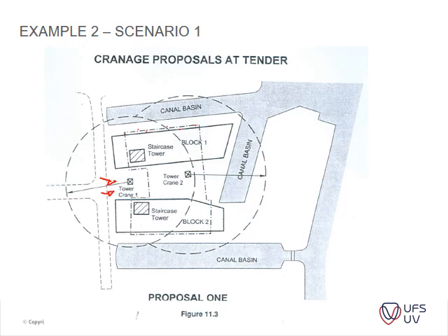You can see the access is limited to this crane here, because it doesn't necessarily reach everywhere. So that's one of the considerations that you need to take into account, is access to site and to where the crane can actually go. Okay. So, but just go read through it. I think it's fairly straightforward.